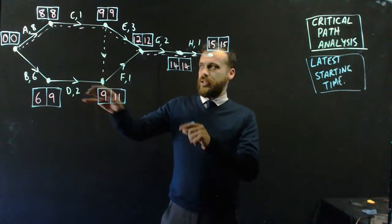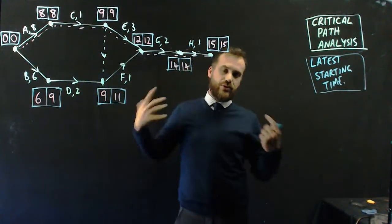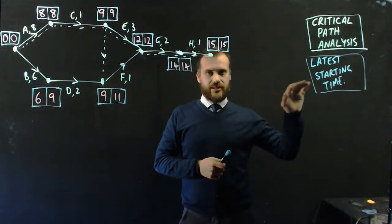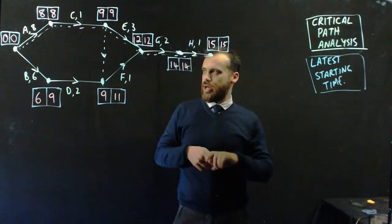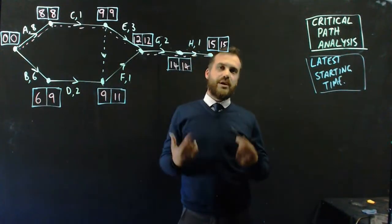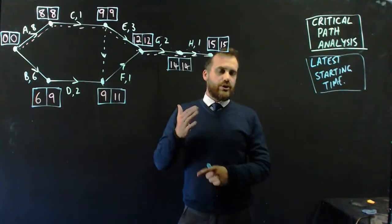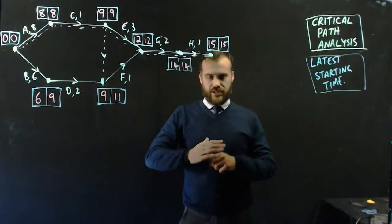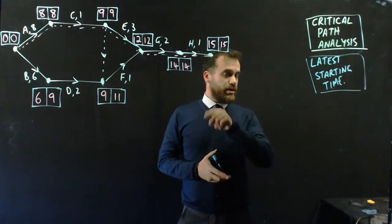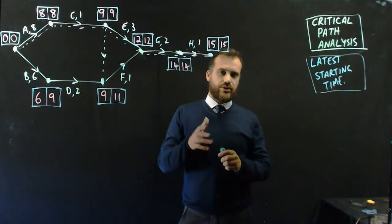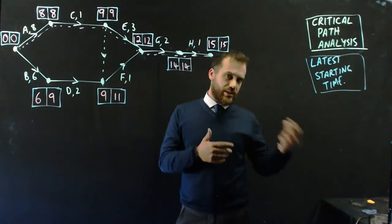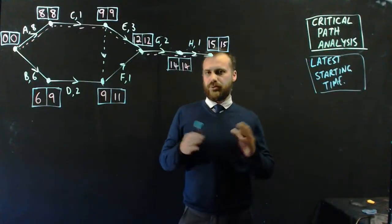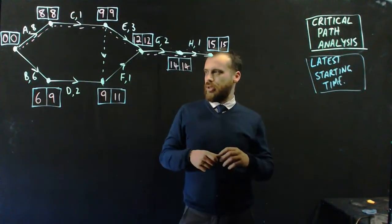Now, all of this is great, and I can find the critical path using this, but what I also need to find is latest starting times. Because if you imagine all of these activities as people, I can say to them, you have to get here at 11am because you have to start work on this. At the very latest, you better be here at 1pm because you need to lay the bricks, so that the next person can be here at 4pm to do this job. Really important in project management.